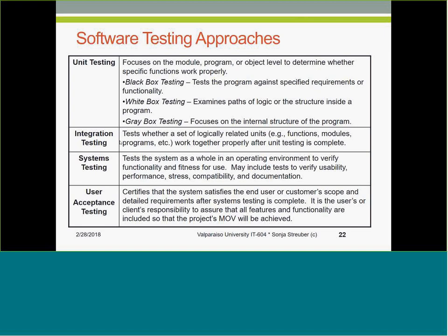In systems testing, we take all our new code and insert it into the existing code. Part of systems testing is also regression testing, where we check that the old code still works when it connects to the new code, and that the new code does exactly what it's supposed to do within our established environment. So that's our systems testing, right? And we do stress testing there as well, or smoke testing, as some organizations call it. Yeah, we're done with our testing, in which we can fix issues without any repercussions.